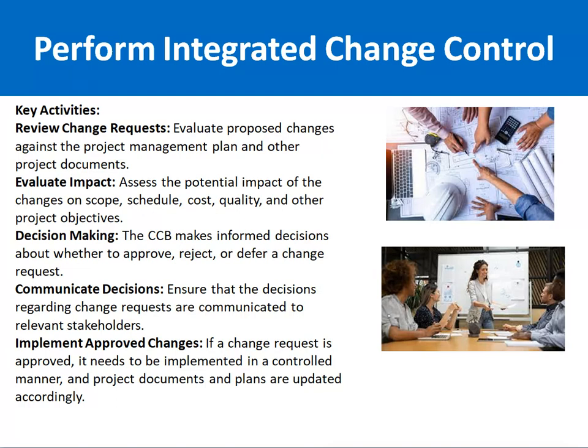Review change request means that whatever change is required has to be evaluated with respect to the project management plan. Then evaluate the impact in terms of scope, schedule, cost, and quality. Then decision making lies with the change control board, which has the authority to approve, reject, or defer any change request. Communicate the decisions to all the relevant stakeholders and document them properly as well.